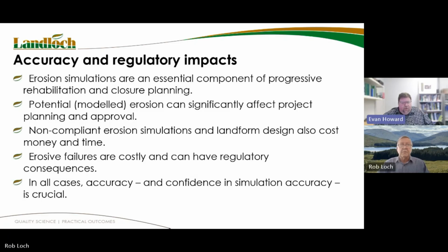And we've seen where the landform is designed, or at least built, so that it matches the final landform shape, that figure can be reduced to 30 or 40% of the cost. So the use of models is actually quite important and does have significant cost implications for mining operations.